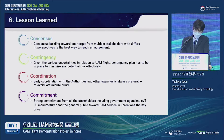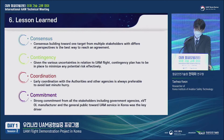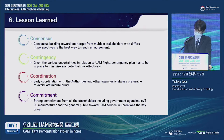Finally, I'd like to share some key lessons we have learned from the flight demonstration project. First, participating stakeholders may have different areas of interest, and this sometimes leads to conflict of opinions. We were able to resolve differences through consensus building, with safe flight as the top priority. The second lesson is the importance of the contingency plan. Given the nature of UAM flight — which has not yet technically matured and has no regulatory framework — there exist many uncertainties. From the early stage of the project we always asked ourselves 'what if' and prepared contingency plans.